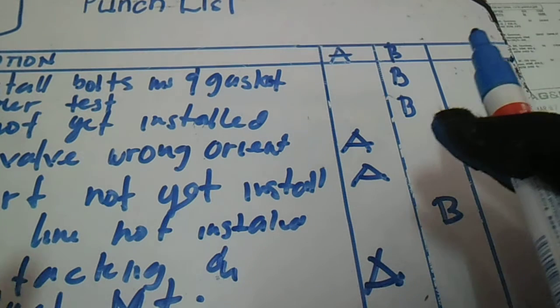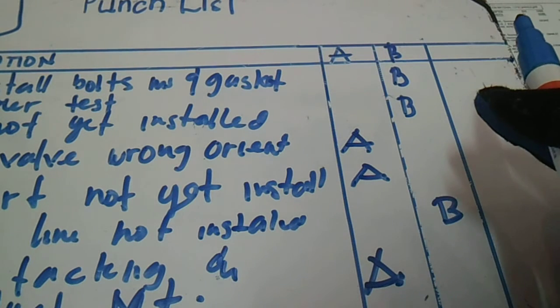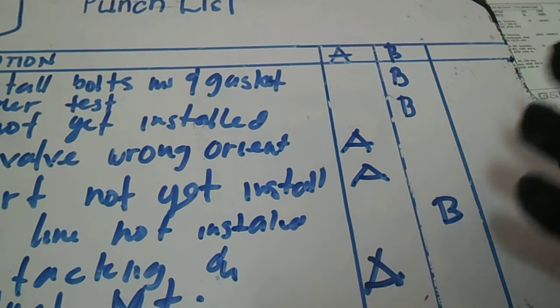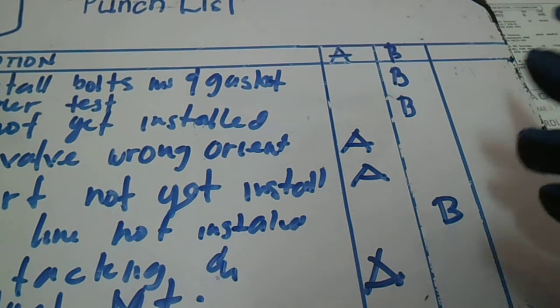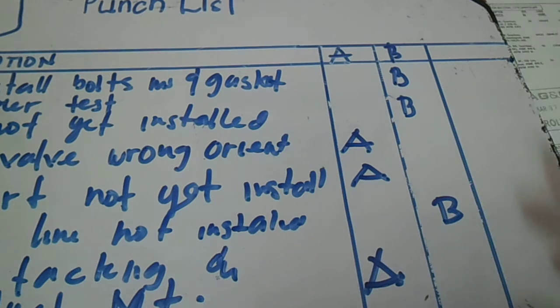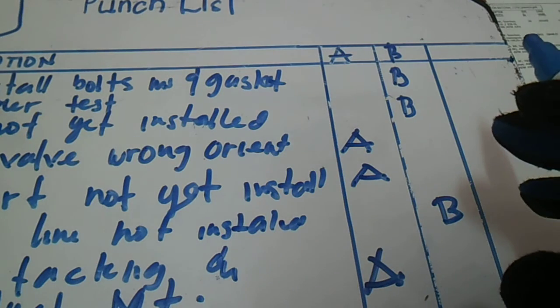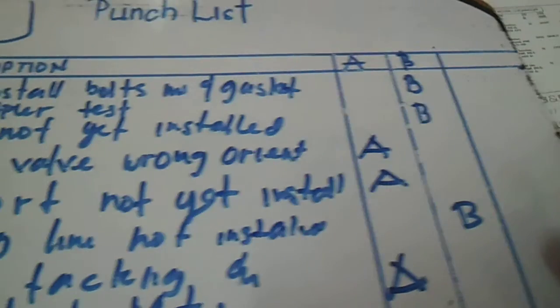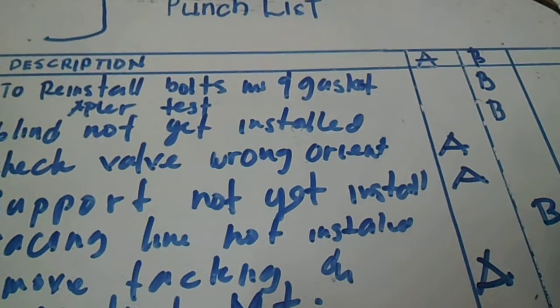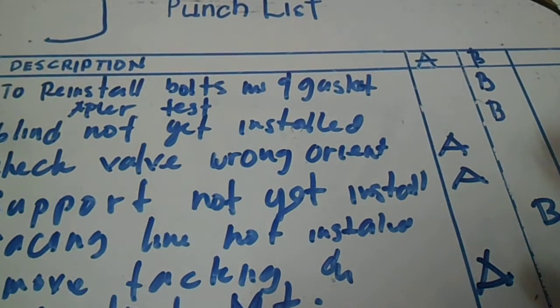After finishing the punch list, attach it to the test package and make a copy. Give the copy to construction so they can correct all the comments — install all not-yet-installed items, correct all wrong orientations, and conduct flush/empty.